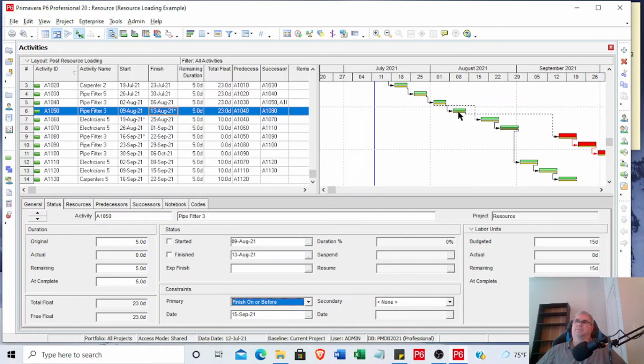We have had some activities that are basically called filler work. Filler work is basically something you can do whenever, and it doesn't really hit your metrics too much. Well, at the place I worked, anyways. But maybe you might use it in the sense that you can do it whenever, when time permits, but you have to get it done by then. Maybe that's the time you'd use a finish on or before.